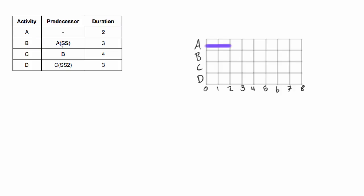Activity B depends on A but it's a start-start relationship. That means activity B can start when A starts. That's the definition of the start-start relationship. When we look at the Gantt chart and we see where activity A starts, it actually starts at the very beginning of the project.